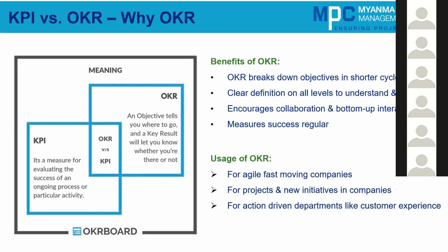So in order to break it down, you really have to define stage objectives. So what are the objectives after the first 3 months, after the second 3 months, and so on? And you can measure the achievements on that, before you hand over.